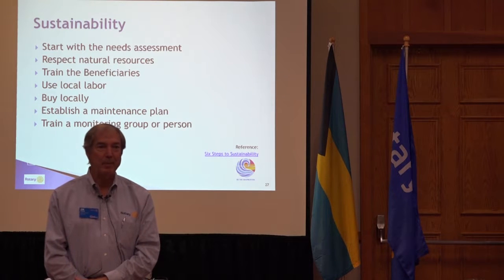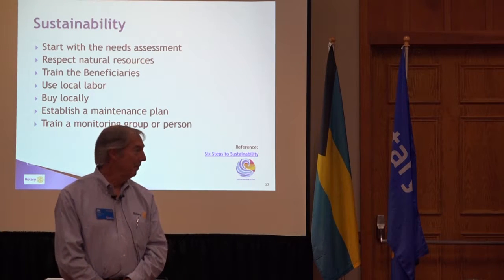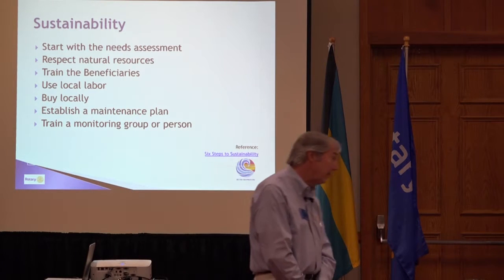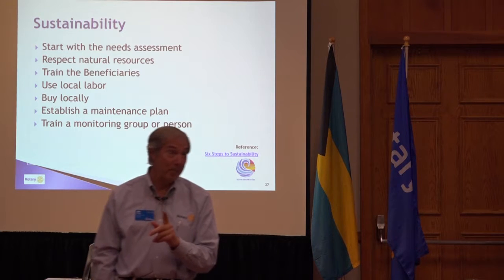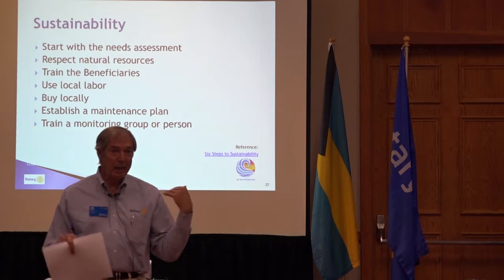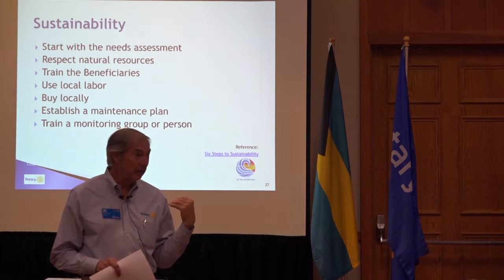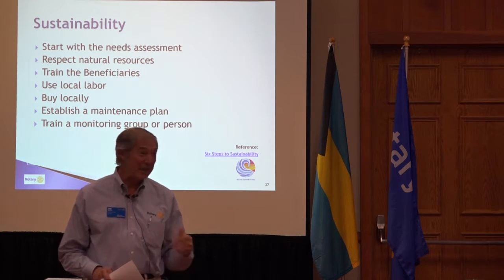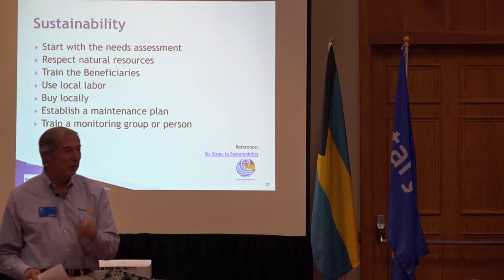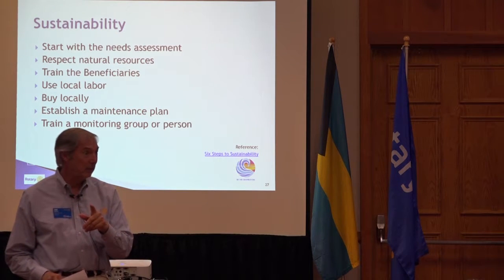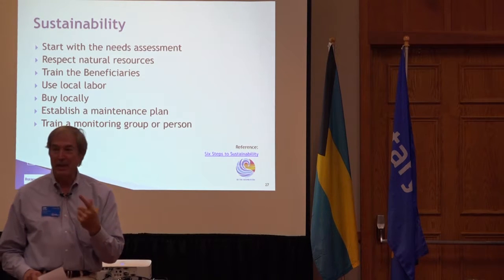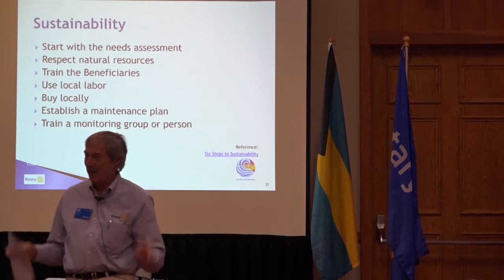Okay, what's the first thing that happens? No fish migration. It's true that there's no fish migration, but actually before that, somebody downstream is probably going to come break your dam. As soon as you started filling that up, they saw their river dry up, right? And what are they going to do? They're just going to curl up and die? No, they're not. They're going to walk upstream till they find out what stopped it, whether it's a beaver or you, and they're going to break a hole in it. You can patch it all you want, and they're going to break a hole in it. It's because you're not considering this as a natural resource.